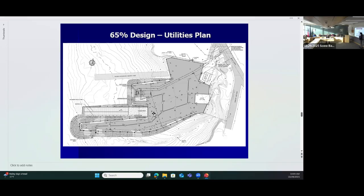There is also, I don't have a confirmed number on how big of a tank it is. Martin Odegaard of Public Works might know, but there is a buried tank here that we used to use for our pump testing long before I was involved. And I think in 2017, 2018, when they called to remove it, they determined it was too big, and so they just crushed it. And in talking with Dick, he says that's probably going to need to be removed if you're moving those big vehicles on it. So that's another expense. Just know that. Those are my points. I just wanted to point it out because this is the first time I have been invited to these meetings.